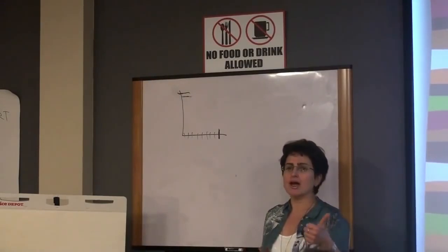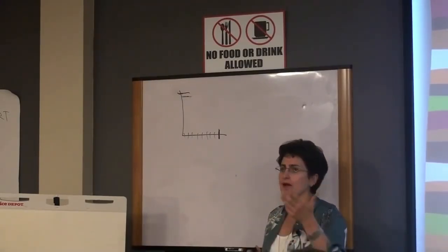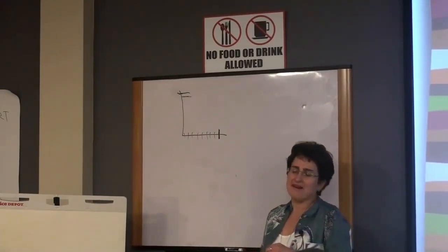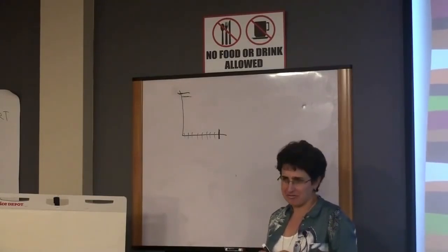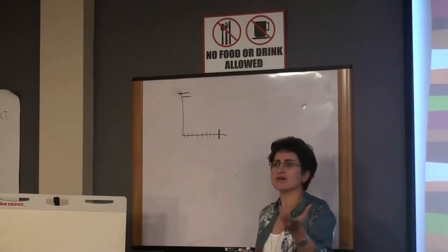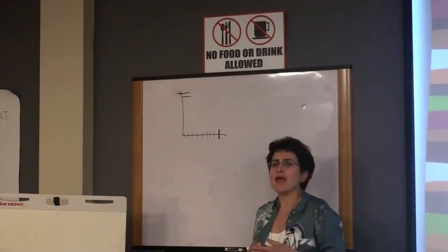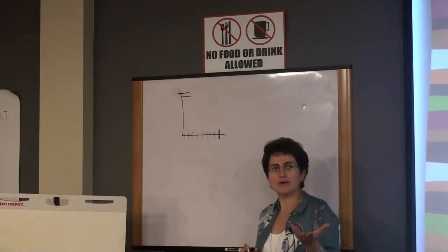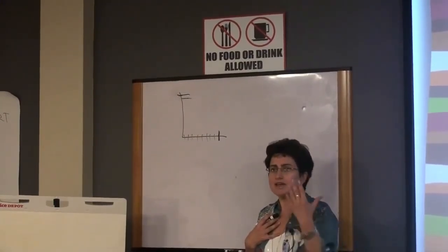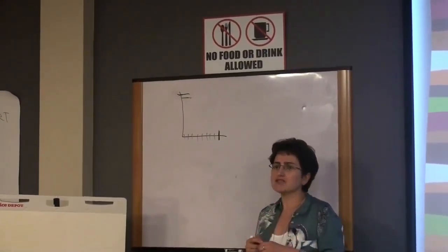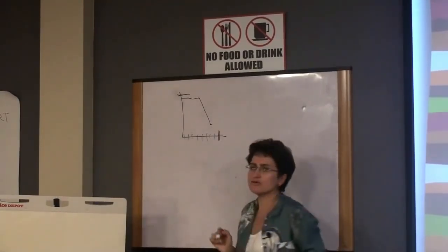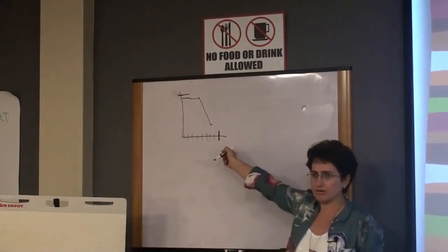It may be vacation, lack of hardware, software, we are stuck technologically. Or change Scrum master. Yeah, maybe the Scrum Master is not doing the right job, right? Or maybe everyone, development and testers, are working on a very complex task, and we cannot call it done because we are not done yet. But we trust each other. And if on a daily meeting people tell you, yes, we are progressing well, and as soon as we are done with this task, let's say on week 2, we'll be done with most of it, then it is still okay to have this trend.